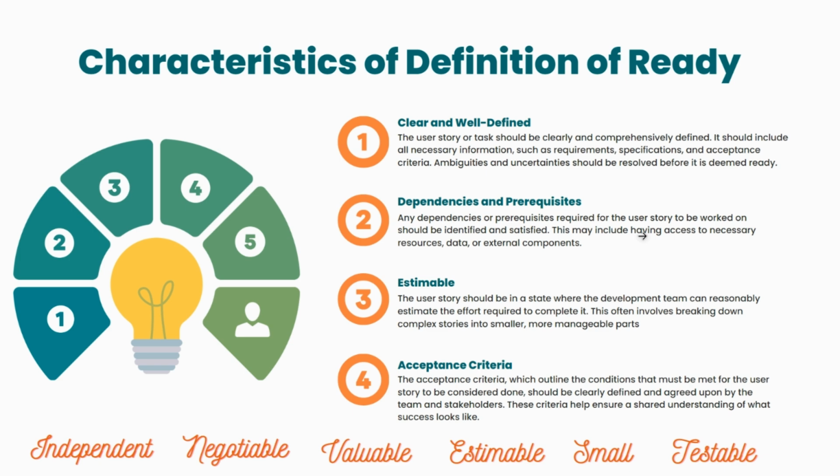For any story development, if any dependencies are there, that might not come from the product owner, because that might come from the technical aspect of the story. But when the grooming is happening, at that particular time, dependencies and prerequisites should be understood among the developers, figured out, and mentioned in the story.